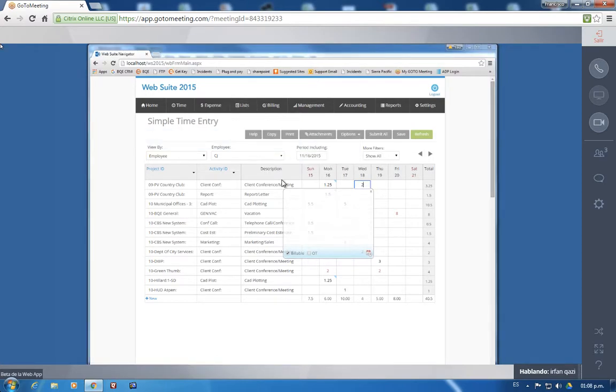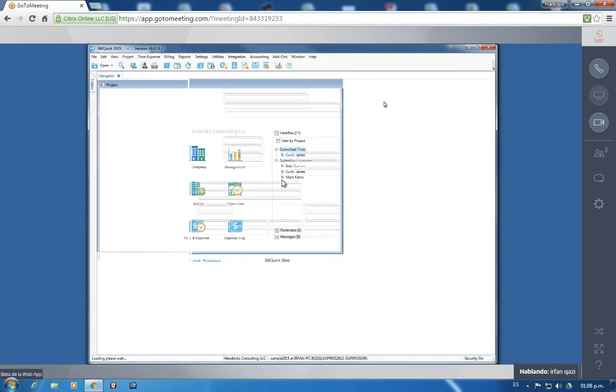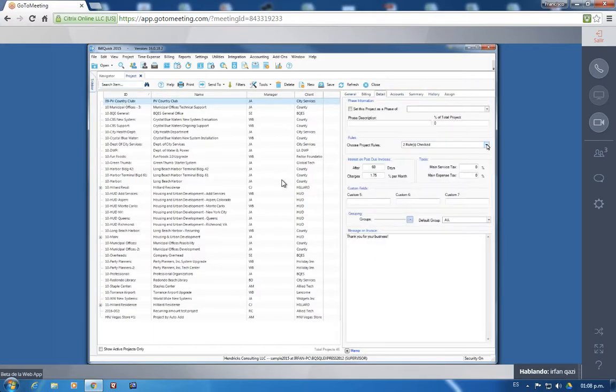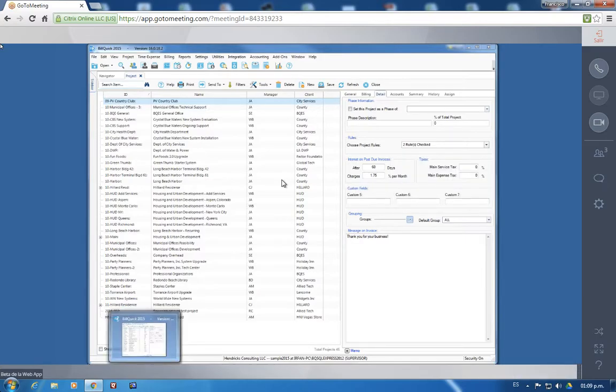Also, you can do one thing. If you do not want your employees to go beyond allocated hours, because you want them to come in and explain why they finished the hours when the project is still going on, you can set up a rule on the project where you can say lock at allocated hours. Okay. To be honest with you, they have to comply with the two hours. ¿Y pueden modificar las anteriores?